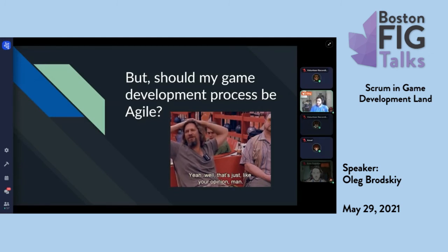And that might be true for your team. Going back to the uncertainty, if things are more certain, both in terms of your technology and in terms of your requirements, you don't need something like Scrum. It's going to be too much work to have the sprint planning and the sprint retro and the daily Scrums. They're just not going to be useful. And Waterfall might be perfectly adequate for your needs, but you need to evaluate your needs and understand, is this the right approach? And if it's not the right approach, making the switch.